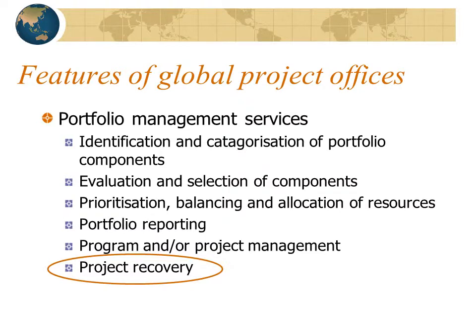The key to project recovery is identifying the underlying causes of the issues in the project. As a third party, a project office is able to objectively determine the issues and also has access to resources within the organization which the program or the project may not have in order to address the issue.